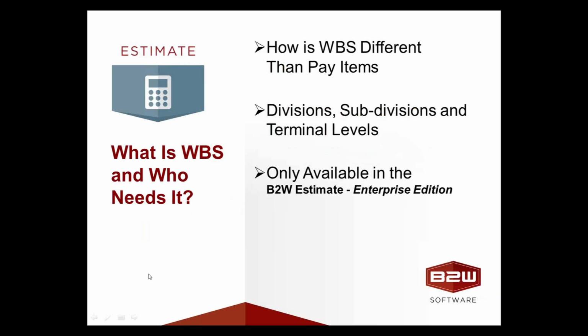Inside a work breakdown structure estimate, it's really designed around the concept of being able to cost an estimate the way that you would actually build it out. And so you'll see that you can take a project and carve it up into logical groups called divisions. And you can assign codes to those divisions, and you can create a hierarchy of unlimited depth that really mimics how you would want to build it out. So you take a project, you break it into the logical pieces, and each piece can be broken further and further down, and each piece can have an unlimited number of cost elements inside it. So not only is it different in that respect in terms of how you build it out, but you could also dynamically choose at which one of those levels you want to price the estimate. So you could have a lump sum, you could price at the division level, or even lower.